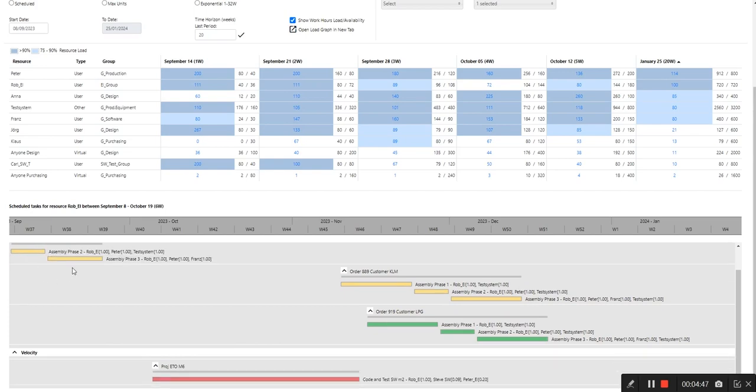He does something over here. Then there is a bit of slack here for him. But the problem is that this one probably can't start earlier. There's something preventing it from starting earlier, and it looks like it is going to cover when you predict you can start working on yours. So here we have a real problem. You have a red resource that is in conflict with your own task. So I think that it's sensible to try to work out a solution between these two project managers.